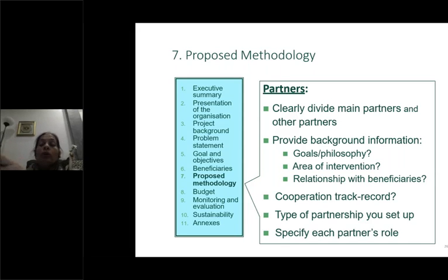So I have to involve each and every co-PI and include that in the methodology, and write how these things are going to work, how each and every partner is going to work, and what the synergy between the partners will be, at what stage the information will be shared between the partners, who the lead scientist is, and who is going to review the work done by each partner. So that's very important in the methodology.